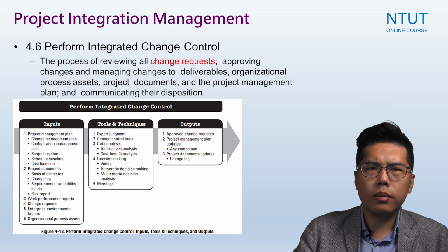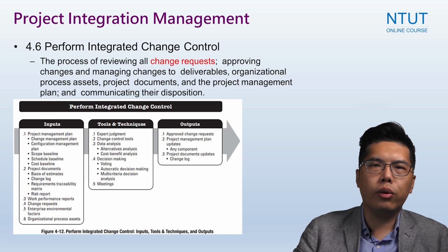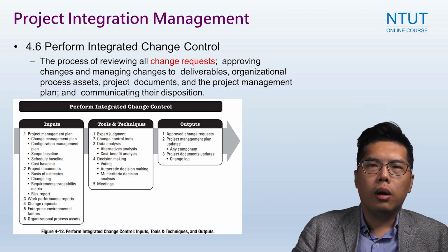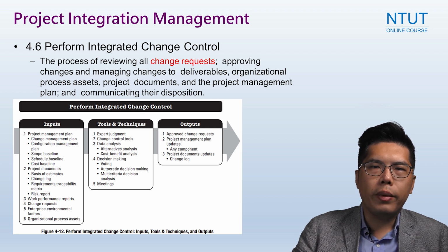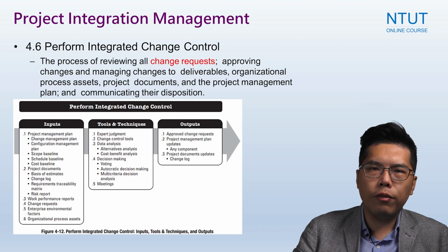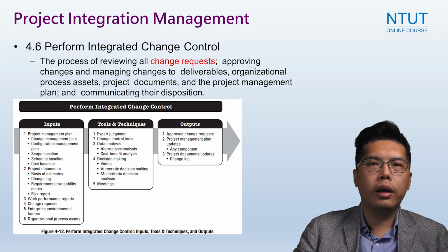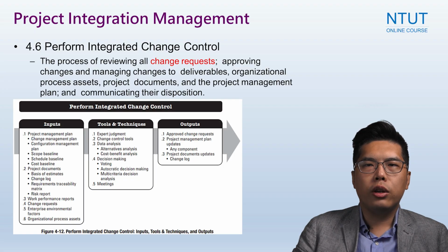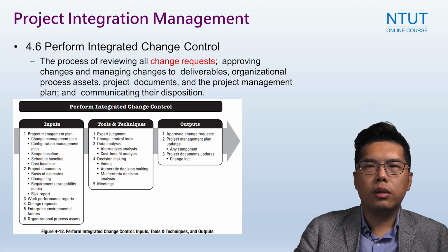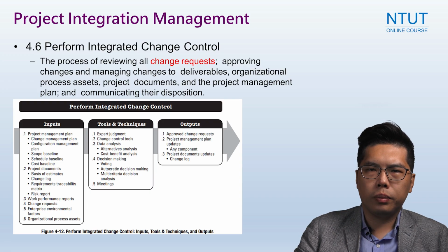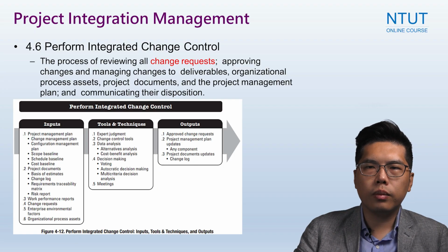So any modification, or you can say any change in the project management, will be recorded or documented in the log. If a request is approved by managers and sponsors, that means there will have to be changes in the project management plan. So we'll go back to the planning process.